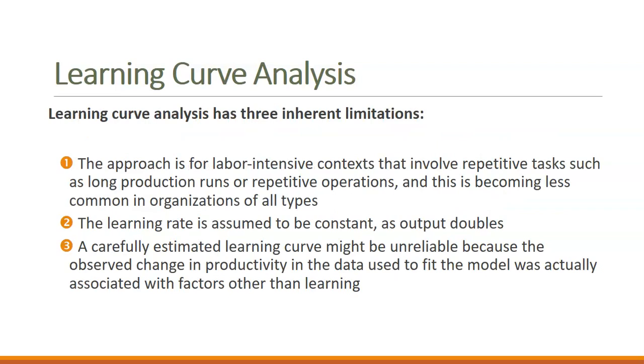Some of the limitations of learning curve analysis. It assumes that there's a constant rate of learning. It also only works with extremely repetitive tasks. Anything that's a specialty item doesn't work. We need very repetitive tasks and repetitive operations.